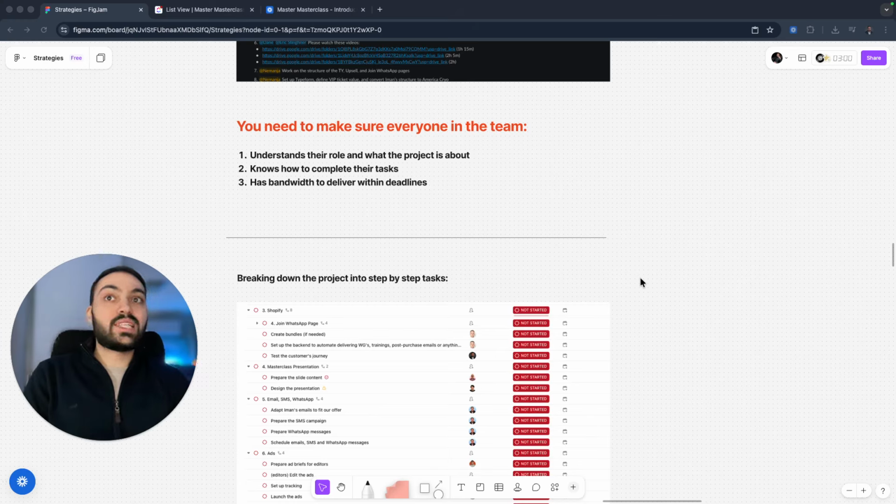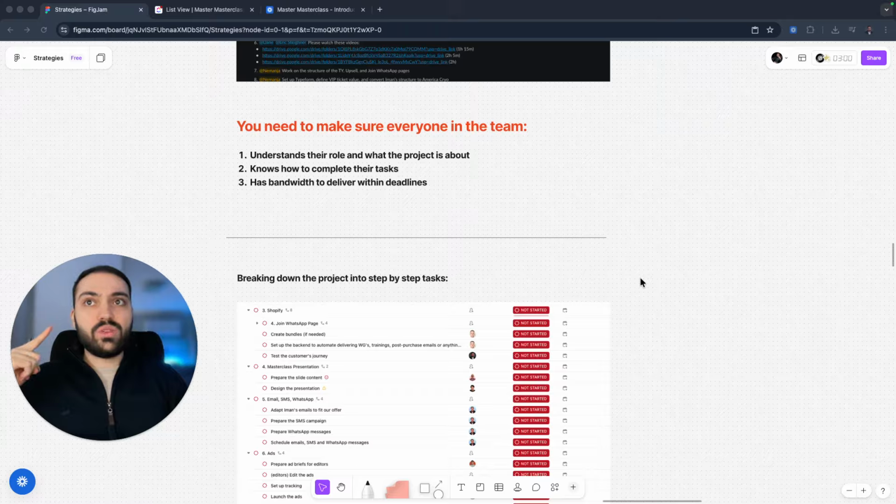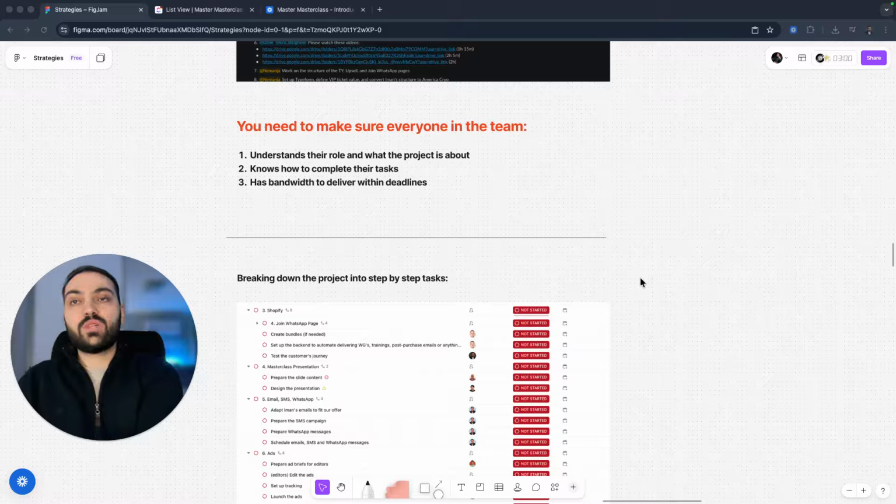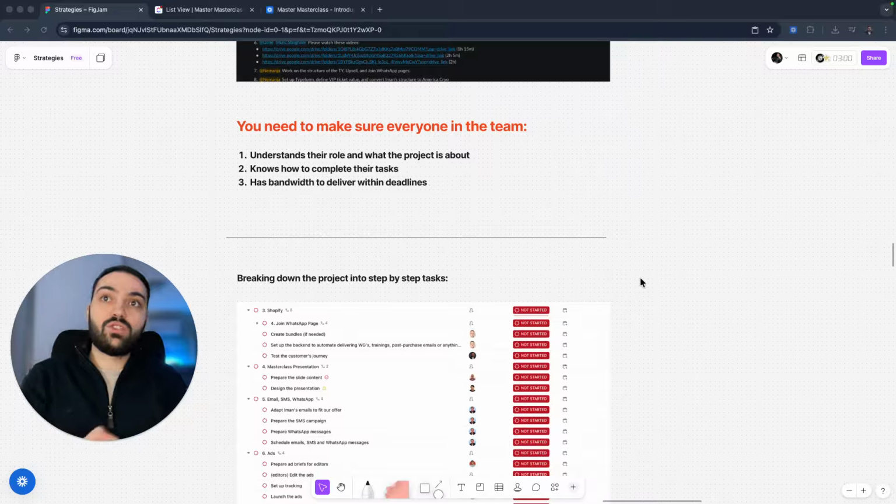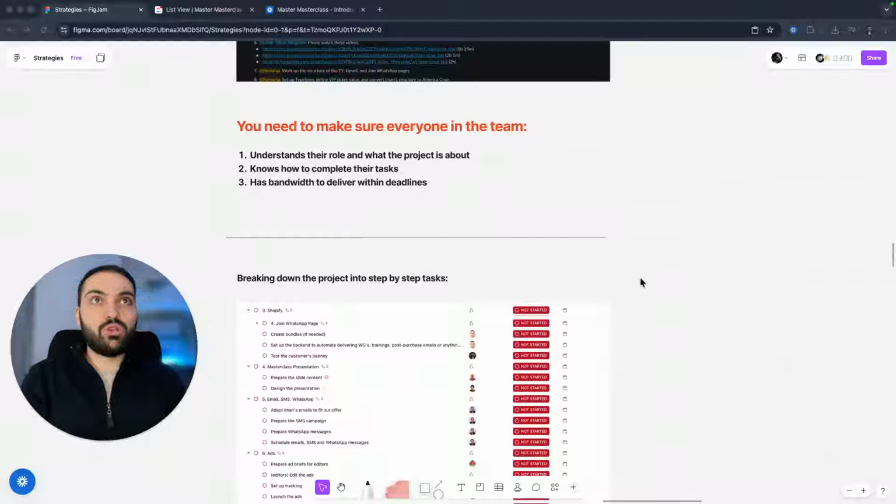Even before you go into production, you need to think, okay, last time when we did a similar type of project, we had this kind of issue. For example, we had an issue with the backend not sending automated emails for all of the purchases. So now I know that was a problem last time, and I'm going to mention it and make it as easy as possible not to mess it up this time for our employees. So I'm going to mention how to fix those problems up front. Even if we don't end up having that problem, they will have the solution if needed.